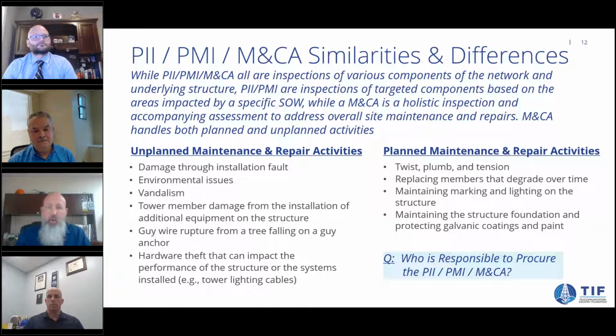At the foundation, they are all technically inspections, but they are also all very different. The PMIs and the PIIs are going to be very directed at a certain activity that just happened on the tower. Like John said, if there's a structural modification, an antenna modification, or potentially a new colo going on a tower, that's where we're going to trigger a PMI or a PII.